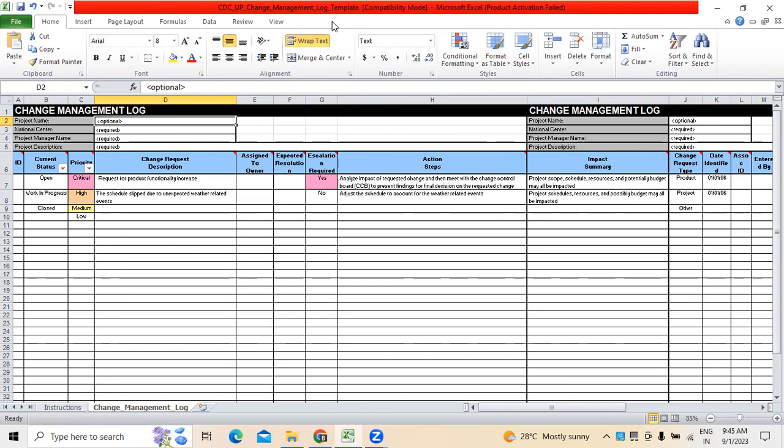There are some practical problems. Either it can be a technical impact, a budget impact, or a schedule impact. Provided mutually, if everybody agrees, then things will go further. Otherwise, whenever we come to a conclusion, there will be three outcomes: it can be accepted, it can be rejected, or it can be deferred, for that particular functionality or the change which the customer is expecting us to make. Usually this is a continuous process when we are working on a project, which normally we do in a real environment. Of course, that's what I'm just sharing with all of you.